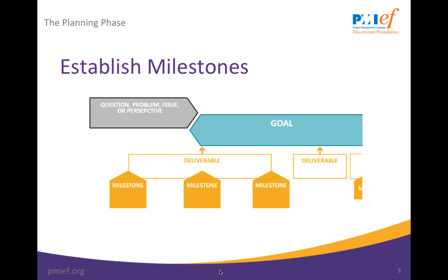Milestones are not written as to-do items. Instead, they are statements of what will have been accomplished. The number of milestones will depend on the duration and complexity of your project. Milestones are the first step in the final deadline and any dependent deliverable deadlines.